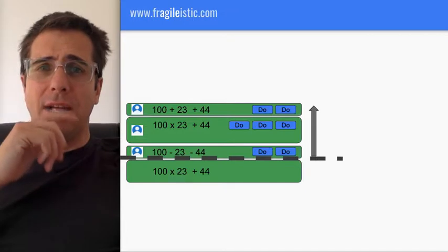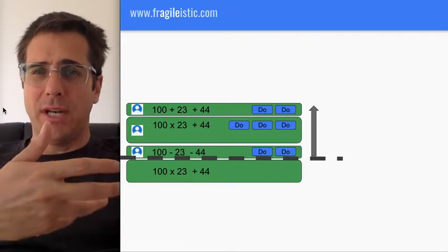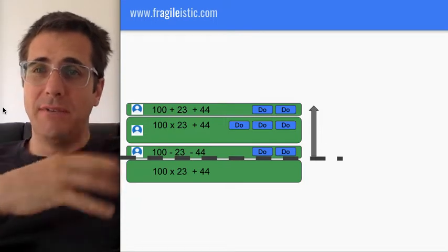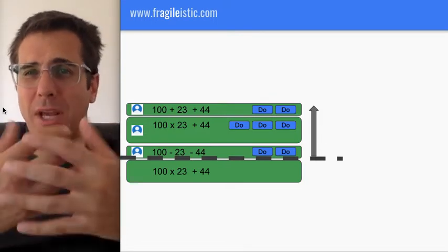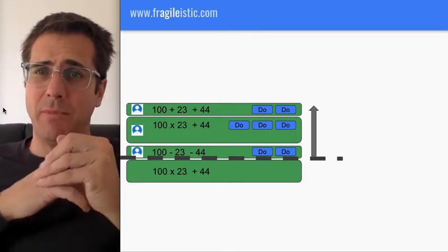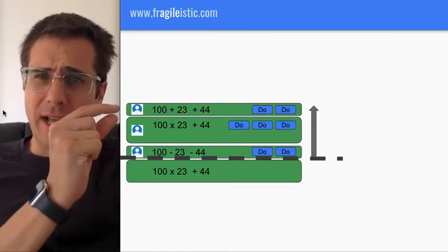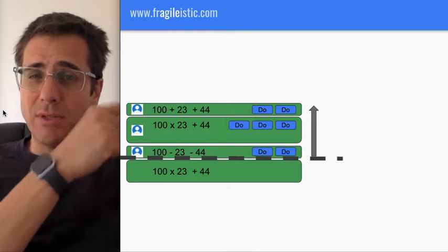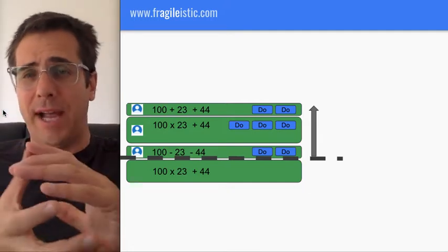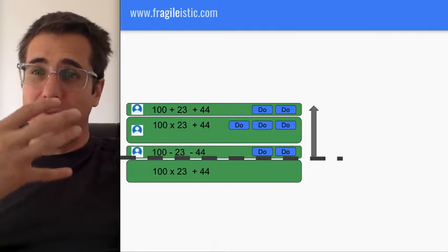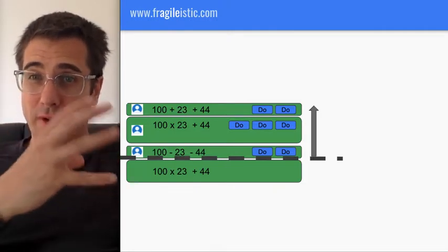Now we're going to look at what happens daily. In the daily stand-up and check-in, we're checking: are we going to deliver these? Is there any way we can help? How can we collaborate between now and the next time we meet? You might talk about the top card and say, we've got 2 items that need to be done in order to do that. Who's going to help with that? You might do a little pre-planning before you go into check-ins, but as a result of the planning step, you would have done a lot of this.